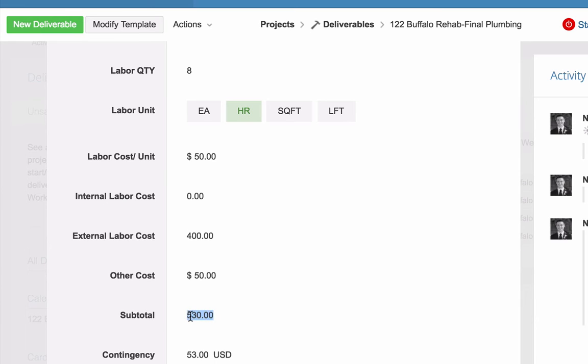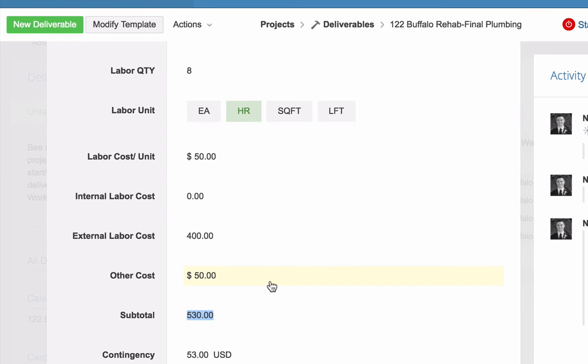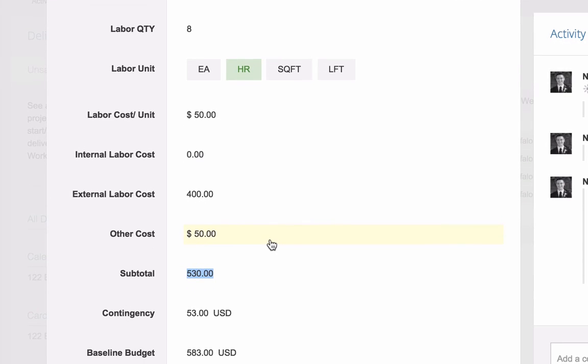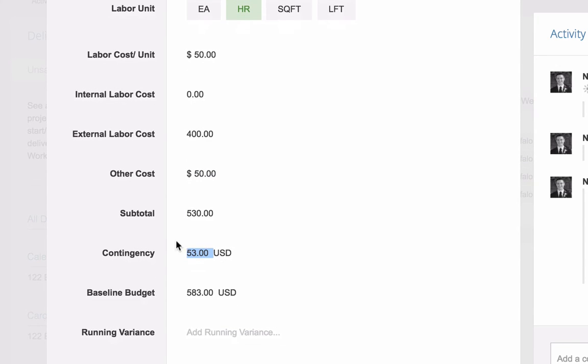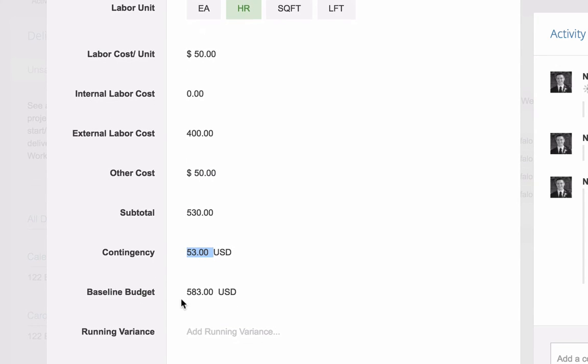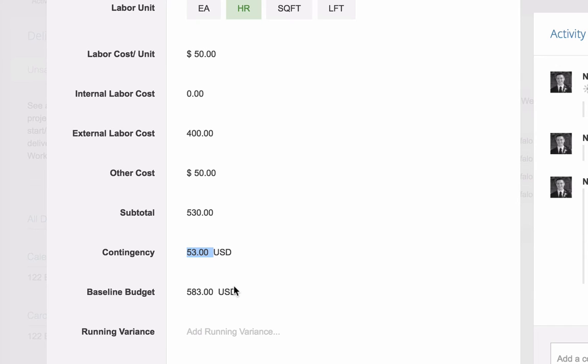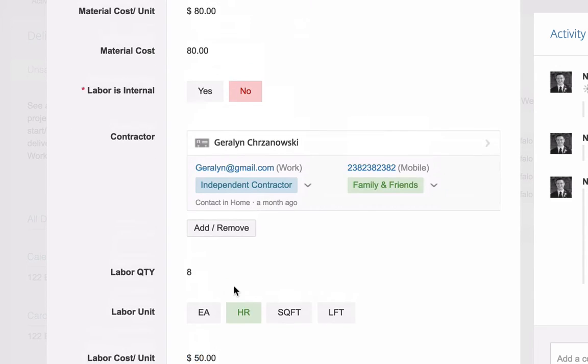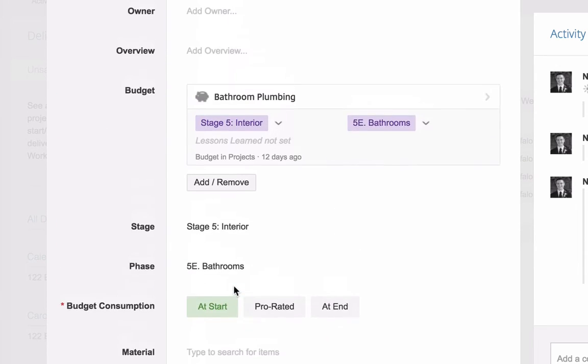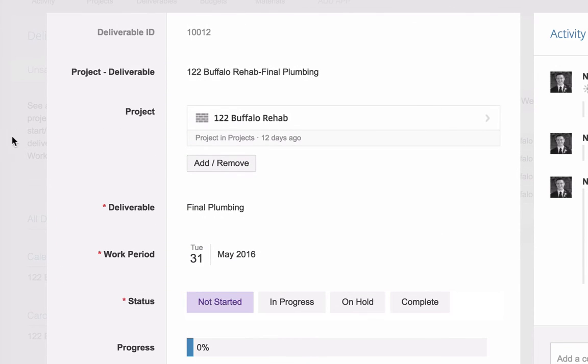That's $530 total for this task. That is the subtotal. And then remember I talked about the contingency back at the project level. I said, I want every single task on this project as I budget it, I want to add a 10% for contingency. Okay. So here's that field. There's that 10%, 53 bucks. And then those add up to my baseline budget of 583. All right. So this task has a budget of $583. I don't even know what it is. It's final plumbing. Okay.